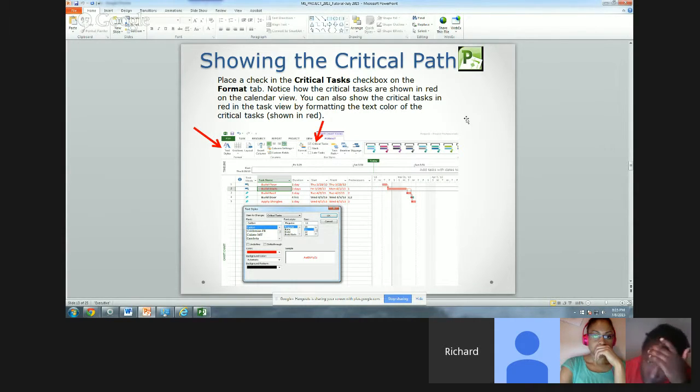Okay, so the build door only takes 4 hours. The reason that's not a critical task is because it only takes 4 hours and it needs you to have the walls and the roof done. So if you're delayed by more than 4 hours, it would become critical. But you could delay that by 2 hours and still build your door, and it's not going to delay your project. Is that clear? Yes. Okay, perfect.